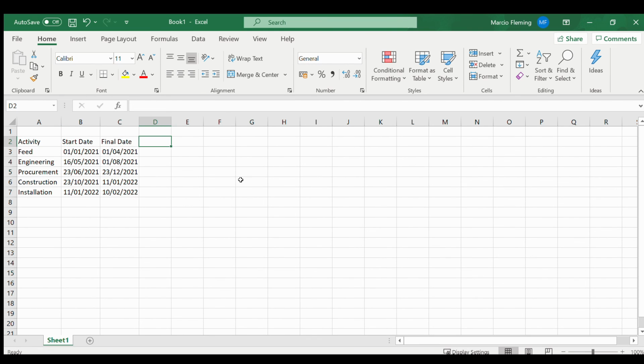In order to better organize our Gantt chart and check if everything that we are doing is correctly assigned, we will include a total days column. So what we are going to include here is a deduction of the final date minus the start date, leading to your total number of days. As you can see here, we have a half day because we did a division, so we got half of the duration. Therefore, you have it like that. So these are your total number of days.